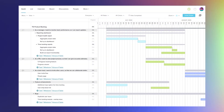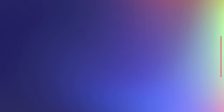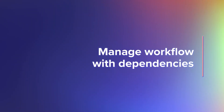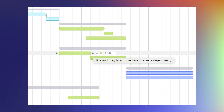See a big picture view of everything in your backlog and schedule features, enhancements, and bug fixes into sprint periods quickly and easily in the Gantt chart. The flexible drag and drop interface makes it easy to move things around on schedule as needed if and when things change. Drag individual tasks into an upcoming sprint period or even entire groups of tasks to quickly reschedule a sprint cycle. Add dependencies between features or tasks that need to be completed in sequential order so you can prioritize your backlog more easily.